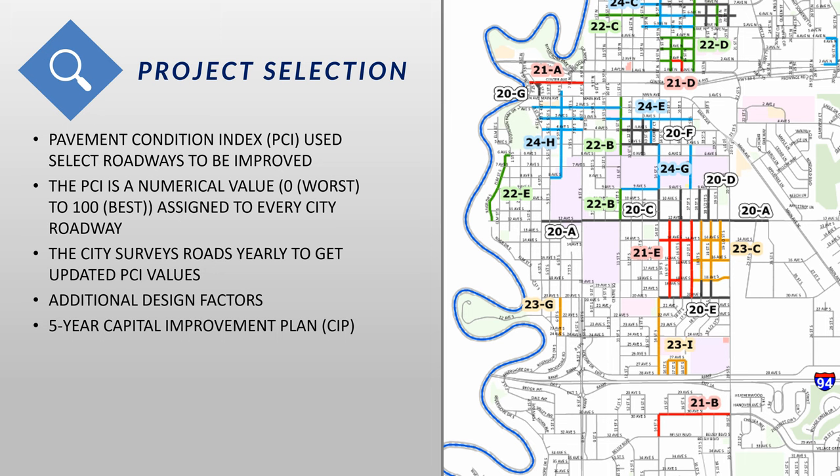The city hires a consultant to evaluate the condition of the road, and we feed that information into our pavement management software to help determine which projects to do based on our budget for the year. We also take into consideration additional factors including the age of the street, how it was constructed, whether any utility repairs are needed on the sanitary sewer or storm sewer, and whether our street work can be coordinated with other utility companies such as MPS and Xcel.